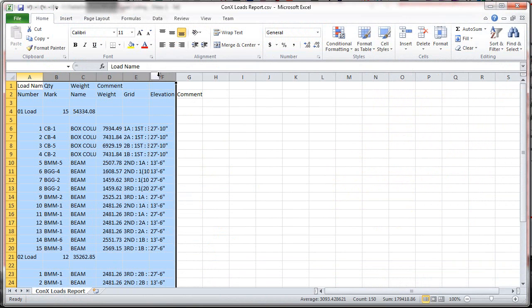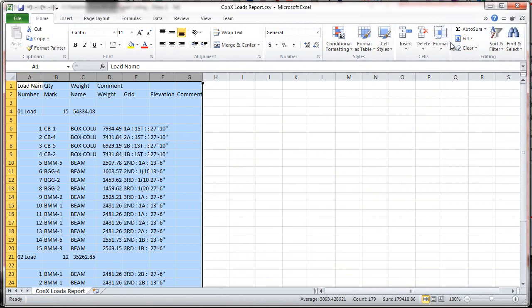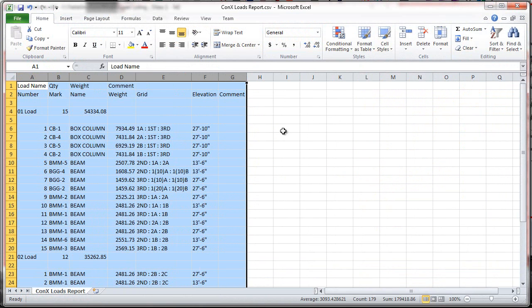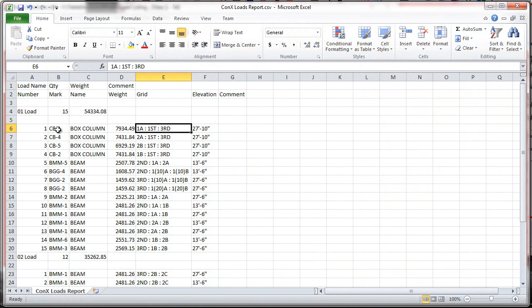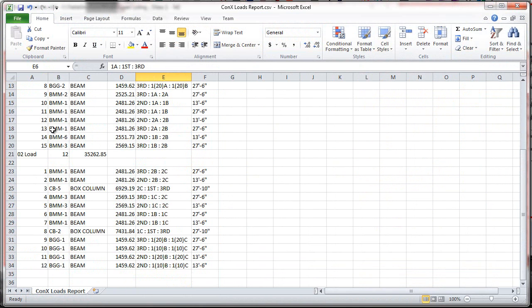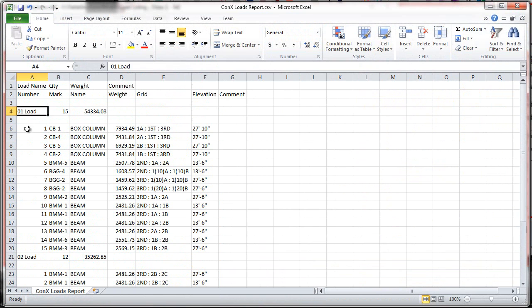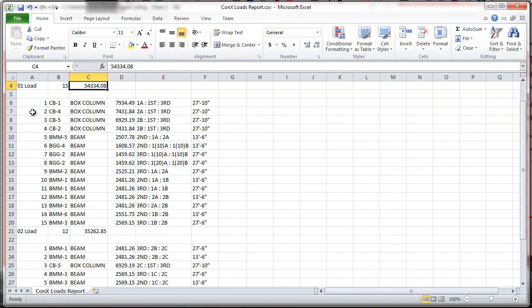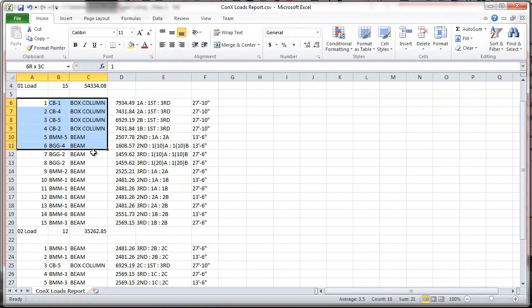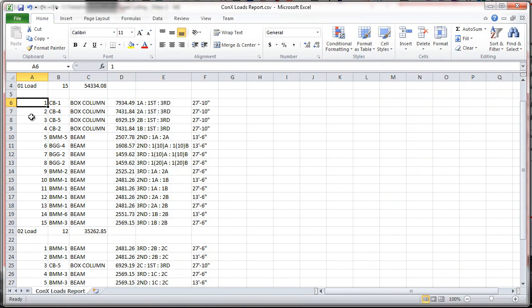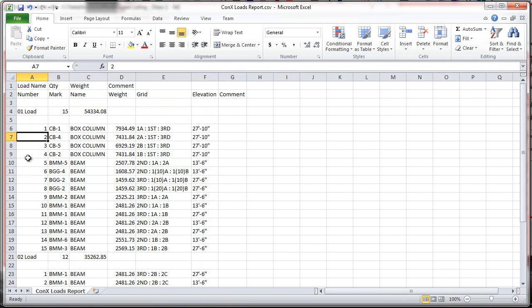And we can then easily just grab these columns, fit the column width there. And you can see then it's an organized report based on each of one of the loads, tells us the quantity and weight, and gives us the itemized list ordered by the sequence number here, as you can see, for that particular load.